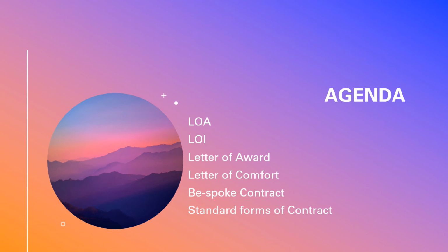So you submit the offer, it's been accepted by the party, and now you are formalizing the offer through a LOA, which is called a letter of acceptance. Please keep in mind, a LOA is supposed to have all the ingredients of the contract. It should have an offer, an acceptance, a consideration, possibility of performance, capacity, certainty of terms, everything should be part of the LOA.